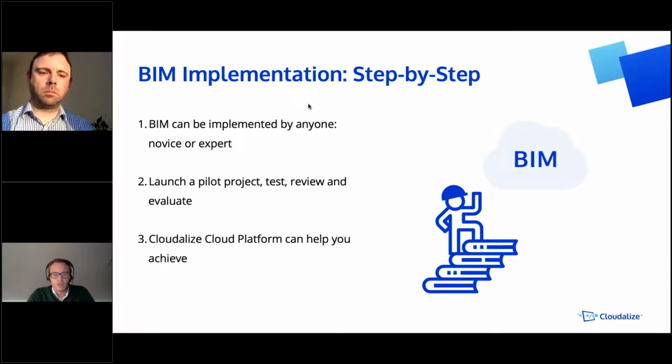But how do we implement BIM? Well, after talking to our clients and asking them how they would start, we came up with the following. BIM can be implemented by everyone, whether it's a beginning company or an expert. The trick is to start with one element and integrate this into the project. Test this, review, and of course, evaluate how it went. And after, you can add an extra element or an extra BIM layer and go from there.